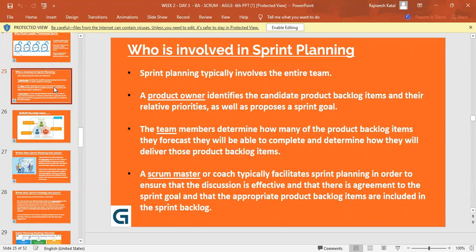So they can be upfront and say, for an 8-people group chat, we would require 2 sprints. It will not get completed in this sprint, or at least we'll come up with this much functionality of having the audio. For the video or chat, we will work in the next sprint. Anything like that. So this is a very simple example for understanding, but I want you to connect to it. So the product owner is the one who proposes it, but the team is the one who determines and foresees whether we can achieve it or not.